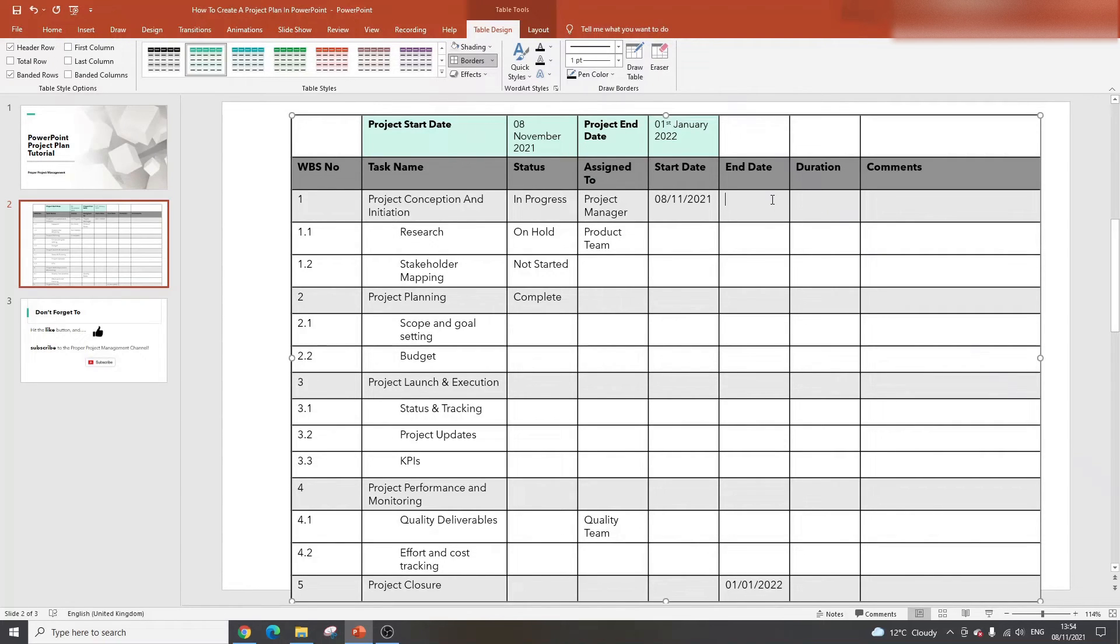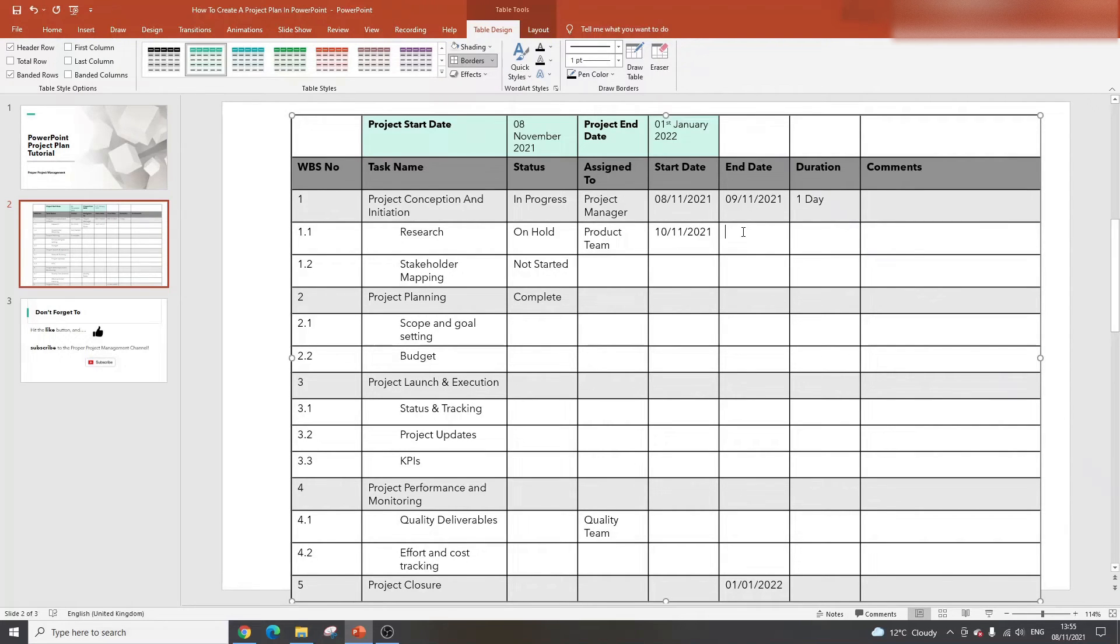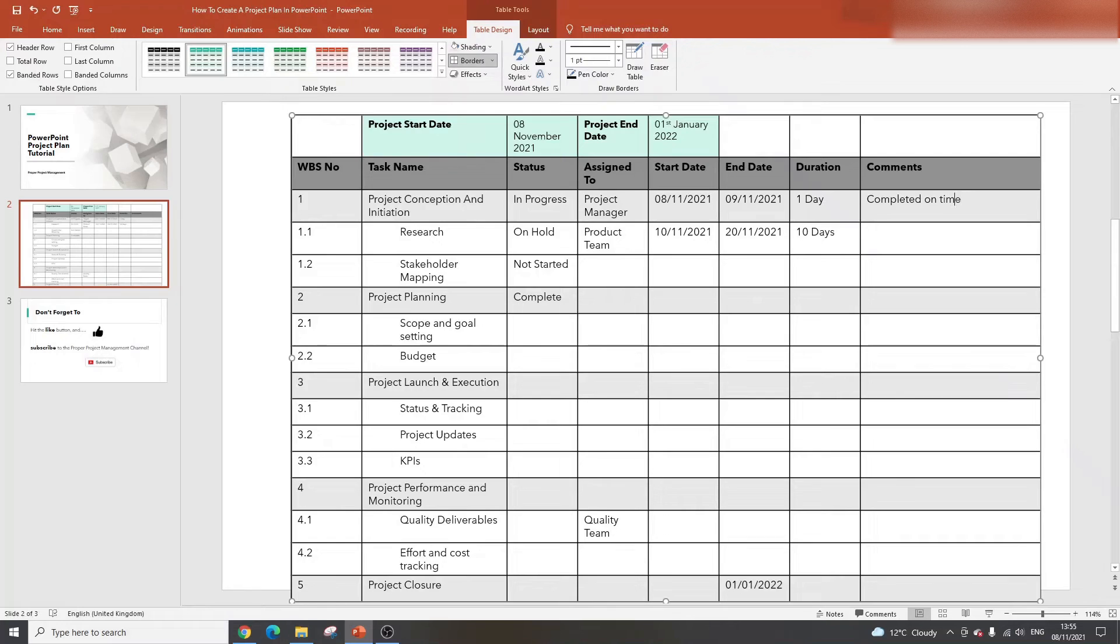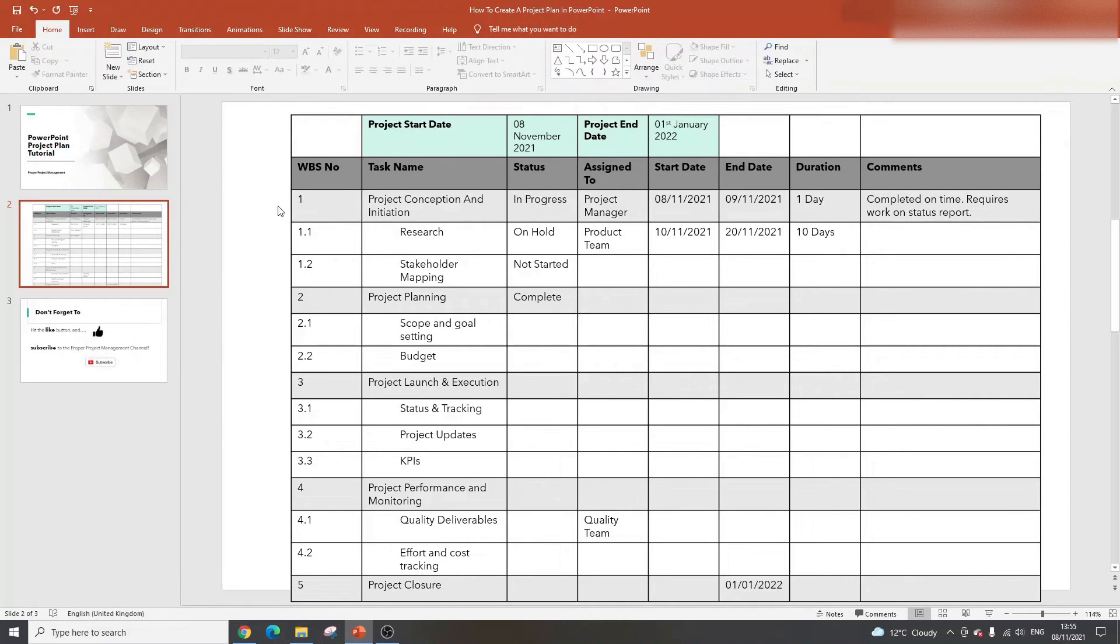Duration is really a calculation on the start and end date columns. So that would be something like one day. If this was 10/11/2021 and this was 20/11/2021, then this would be 10 days. That gives you an idea of what to put in the duration. And here is somewhere for you to enter comments. This could be something as simple as completed on time, or requires work on status report. Just somewhere to enter free text on each of the tasks. I'm going to save it. That's the main way of creating a project plan in PowerPoint.